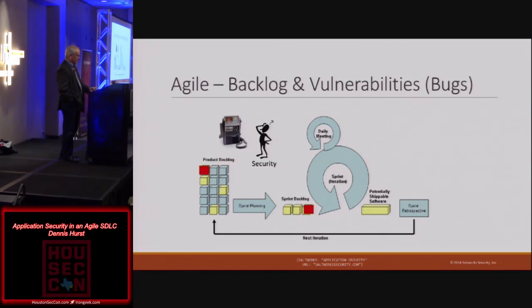That security task thing gets put in the backlog. Sometimes those backlog items are single tasks, like you may want them to do a threat model. Maybe a single thing you have them do. It may be something you ask them to do with every iteration. So static analysis, dynamic analysis, whatever it is you want them to do, you're going to inject that as a user story that gets put into every Scrum.